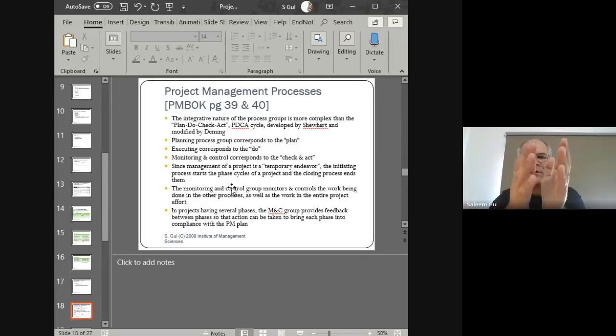In each phase of the life cycle, the phases being the idea, the prototype, the design, and so forth, within each of these phases we have the cycle of PDCA, right? So if we think about design, we have to plan the design, we have to do the design, we have to check the design, and we have to act accordingly. And in the same way, if we think about coding or execution, we have to plan it, do it, check it, and then act accordingly. And so within each of the phases of the life cycle, you've got the PDCA processes run. Right?